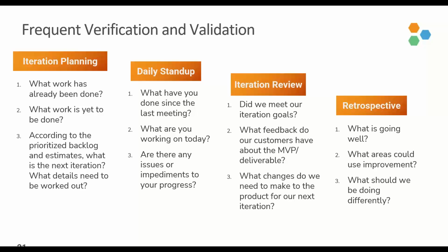Then we have our daily stand-up meetings, and those are really designed to build momentum during an iteration, to have accountability, to help people to remove any impediments. We're communicating. It's a time to find out, what has each person done since the last meeting? What are they working on right now? And are there any issues or impediments going forward? So those can be addressed, and things can keep, like we said, moving forward.